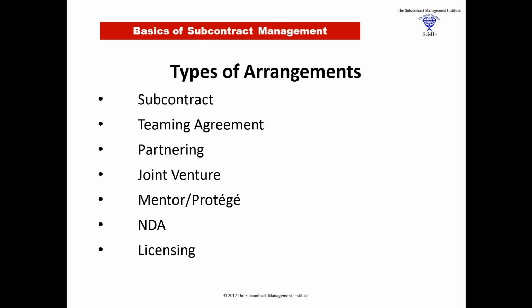And a very interesting case, and I didn't put the reference in here because I just found it recently. The Board of Contract Appeals has said, look, you make a deal with a sub, you can't go jilting them at the altar. You can't leave them at the altar. If you've made the commitment to them, and you try to classify it as an agreement to agree, which is not a contract in the classic legal definition, you still have to be fair. You still have to do it right.